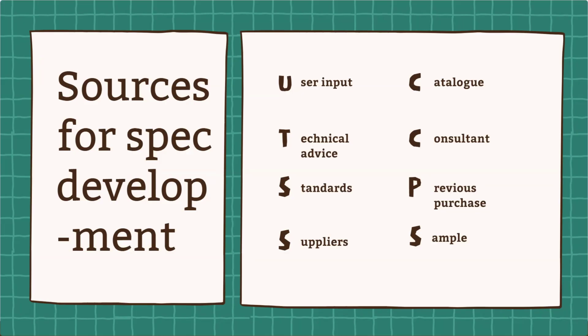They must address a few things like their requirements, could be outcome or output. And then from that, we can develop further by seeking technical advice from the relevant departments, engineering, technical department, and so on. Or we can consult with the existing catalog or standard, and we may engage in market dialogue with the suppliers.